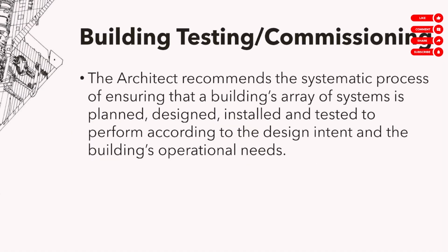Again, from the name, it's kind of easy to figure out what this is about. So dito, consultant ka for testing and commissioning. So we expect you to be able to recommend a good way, a good method of testing and commissioning the building. You're going to recommend a systematic process of ensuring that the building's array of systems are planned, designed, installed, and tested to perform according to the design intent. So magaling ka sa testing and commissioning, you're going to recommend methods of testing.